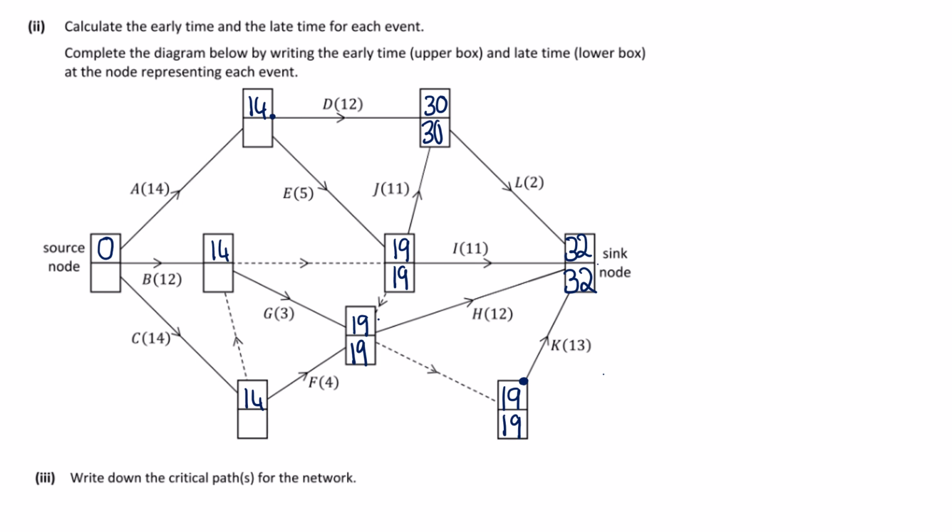So next, let's look here. I have 2 activities coming out of that node. If I were to go down with activity D, that would leave us with 18. E is going to be 14. So we're going to go with the smaller of those, which is 14. And then we could do this one and this one. So we have a dummy, so that's 19, or 19 minus 3, which is 16. Smallest of those is 16.